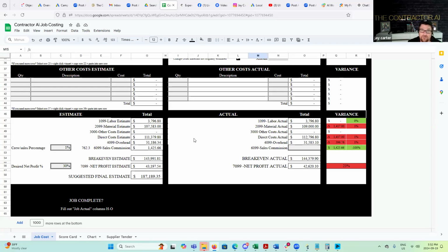All right. Get them under contract. It's not real unless you've got a signature and you've got leverage with that client. So when it comes to a change order, I'll take it a step further, Chris, and I'm not doing the change order until it's paid for.